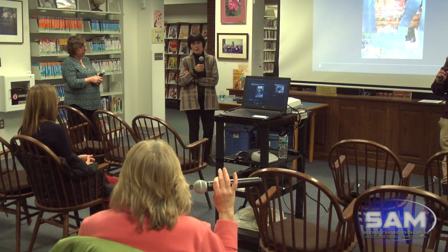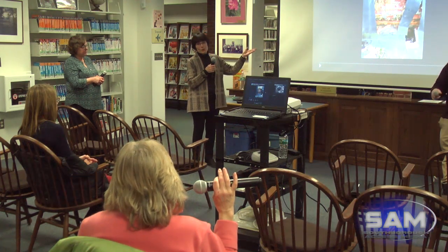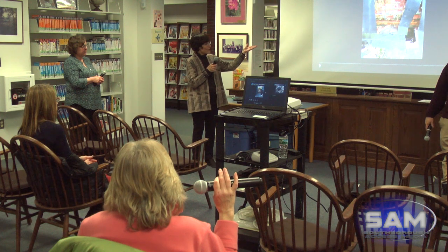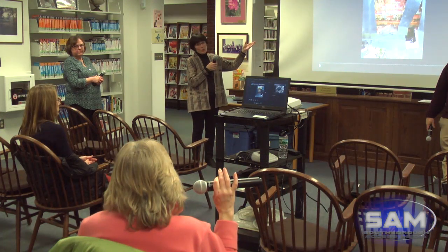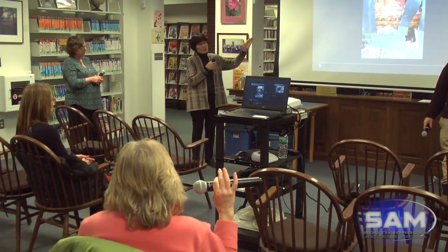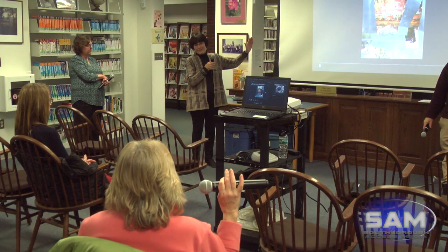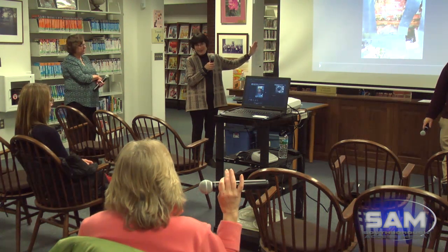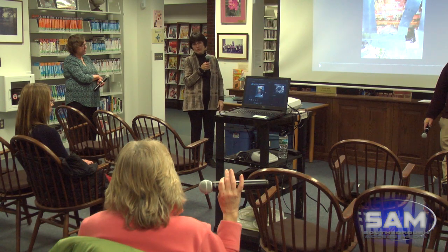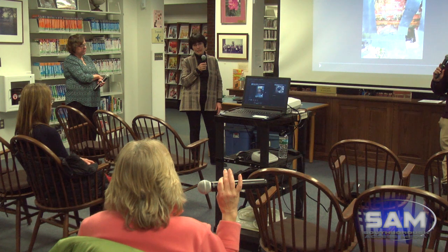So I haven't addressed your question: is there a short-term and interim approach to this? It's a little bit troubling to me to return to this image again, but this was so poorly detailed at the time this roof was put on. It'd be hard to do something that is not going to be a similar thing, but I suppose what you could do is replicate in membrane what was done before and give yourself a few more years, not many, to address the masonry and the flashing issues related to it. It's not something that I would recommend.